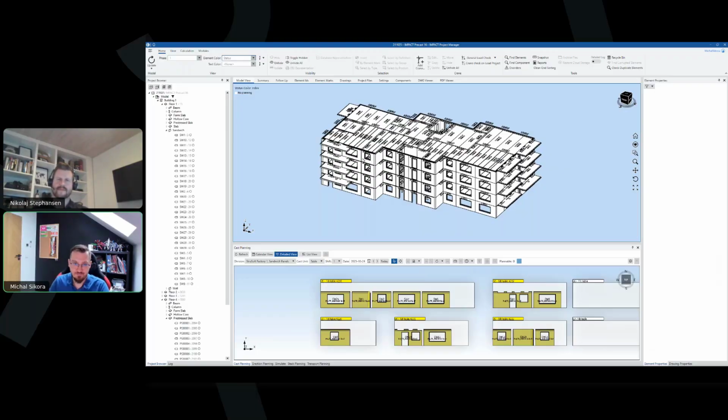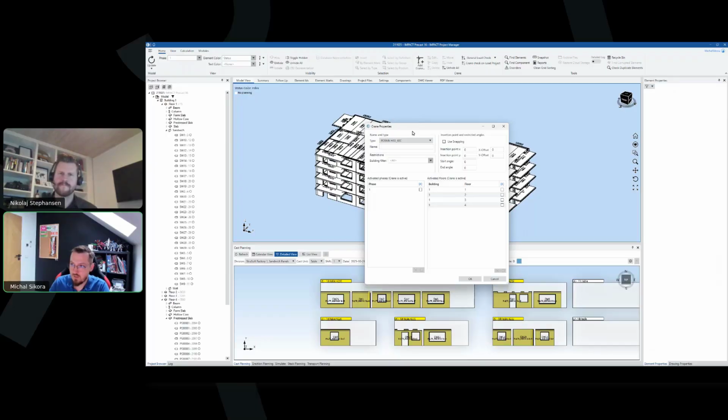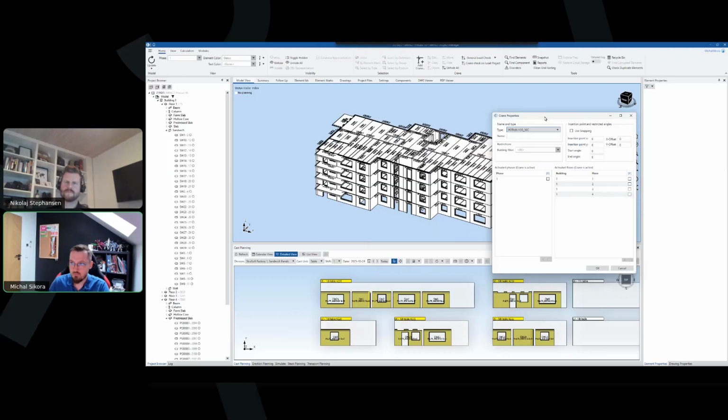Yeah, exactly. So to start off immediately about that crane placement and how you can utilize that, you guys who use it, you know it. You guys who don't, then showcase that it's possible. If your planning and your process allows for any input in the crane placement during erection, and that's for you. Basically, you can have a defined crane with different capacities, different radii of the arm, and that will allow you in model, in Impact, in Project Manager to basically check loads for your elements, whether the crane placement is okay.